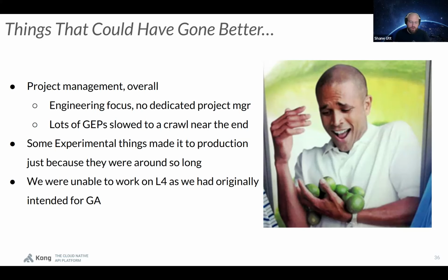We started doing regular meetings instead of the community meeting, just for this purpose, just to organize the project, because that's how active the project is. And this was pretty successful in giving us a way to keep track of everything, make sure we got things in the right priority, figure out what the milestones actually look like and what needs to be released, and push things from left to right and ship it in time for Chicago. And we just made it. We literally released right before Chicago.